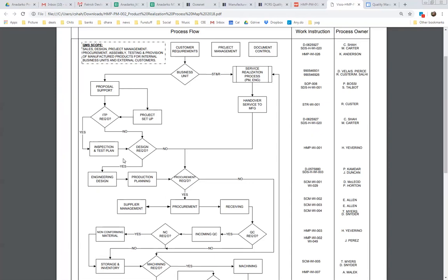Shop, is assembly required, or can you just ship the part as it is? Most of the time, assembly is not required. You take this part and stage it to the PM racks. When the thing is ready and Q30 is supplied, you start assembling it. You test it; 90% of the time test is required. Then you test it, and if there's an NC or anything, you address it. If not, then you move on.